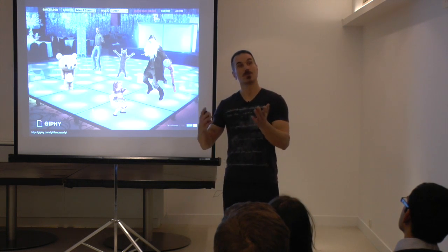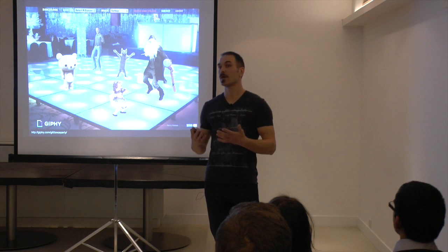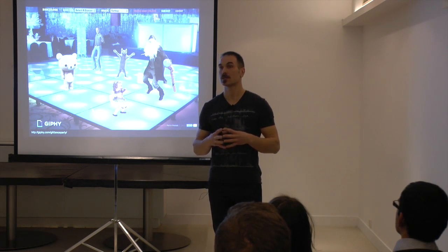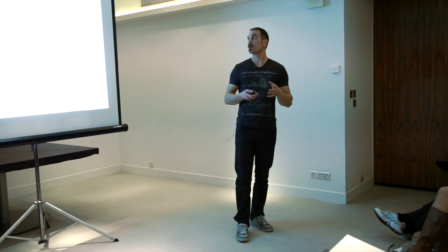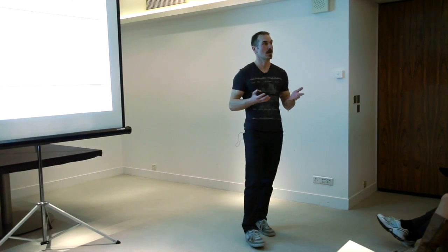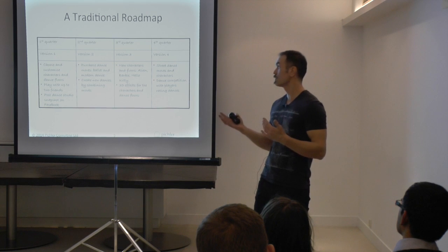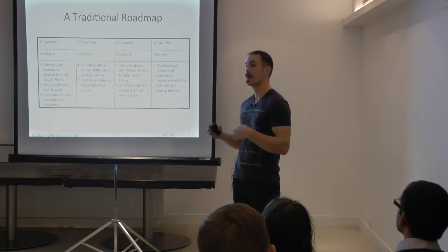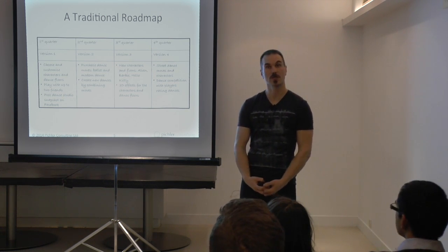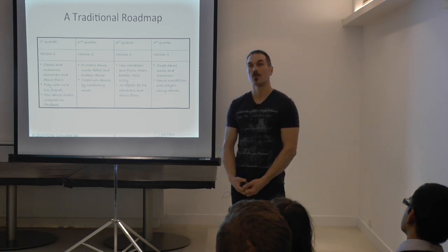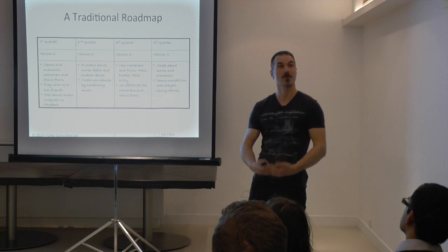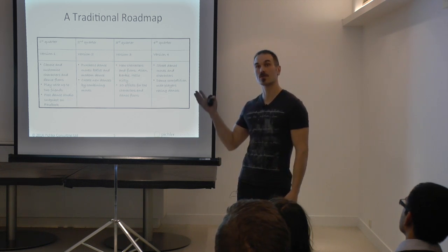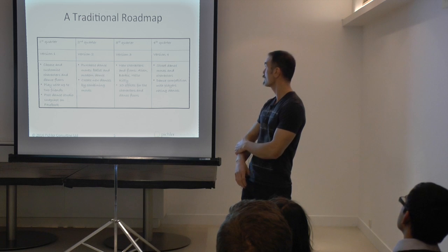Now, if we wanted to build something similar, but maybe more polished, and maybe as an iPad application targeted at kids, then we could come up with the following product roadmap. That would be a traditional approach to creating a product roadmap: a simple table, where we determine the delivery dates or time frame at the top. So you can see I've chosen quarters.